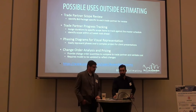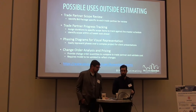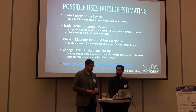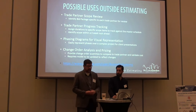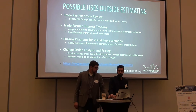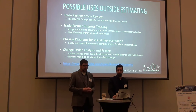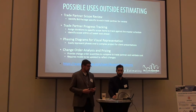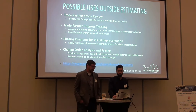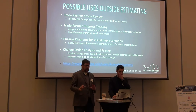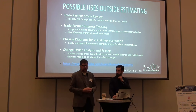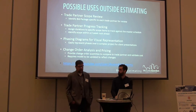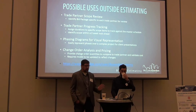There are other uses beyond estimating. For trade partners, we can do scope reviews after a project is bid — we sit down and walk through the model to make sure everything is included on both sides. We can do progress tracking in the field during coordination and schedule meetings. We can do phasing diagrams — we used this on a multi-phase project to show the client what we were doing at each stage. We can also do change order analysis and pricing, validating trade partner pricing by quantities. One pitfall is it requires the model to be continuously updated, which doesn't always happen after CDs are issued.